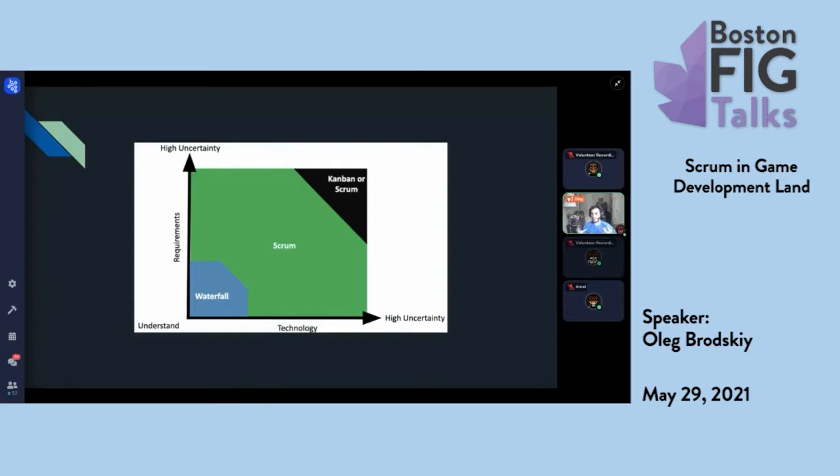So you're at a point right now where trying to work in a very static model is going to be really difficult for you. You're not going to have the flexibility you need to figure stuff out. Similarly, if your requirements are up in the air, and since games tend to be a technology with a lot of uncertain requirements as you go along, you're going to have issues using Waterfall. So, for example, if you start a game and you're making a shooter, but you realize that the part that's actually the most fun is the card game you've built to go alongside of it, well, if you've committed to the shooter, you're kind of committed to the shooter.